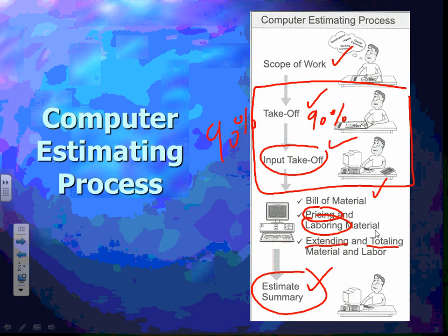Added confidence when you're using software like McCormick or Accurate, guys, tied to a national price for the material. What these software packages do, Adam, is they tie to national companies that give you prices and regularly update the prices for you, so you don't have to worry about Chad Kearney forgetting to put the price in the Excel sheet that he has, right? These are national prices, updated based on where you are in the area and the country.